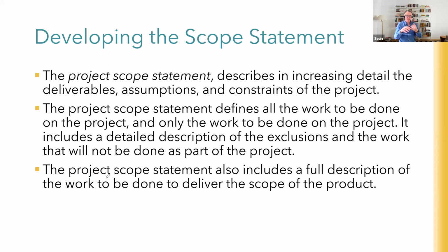Now that document could be text-based, it could be bullet points, it could be plans, it could be technical specifications, it could be any combination of those things which define and document that scope statement. The particular way you define your scope statement will depend on the type of project that you're doing. Obviously, if you're doing a construction project, the scope statement is probably largely going to be a set of plans and some technical specifications that accompany that. If you're doing an IT project, maybe a software project, it'll largely be text-based with technical details about performance as well. So the way you document it will be really important as well.